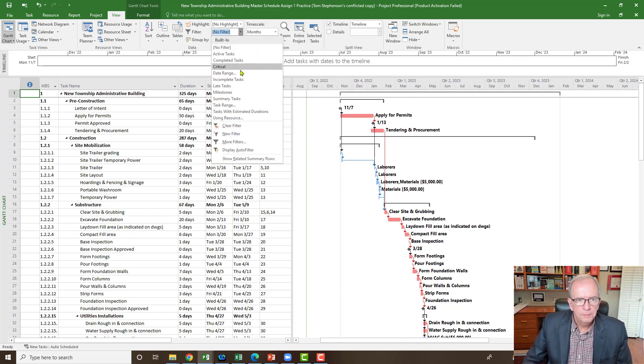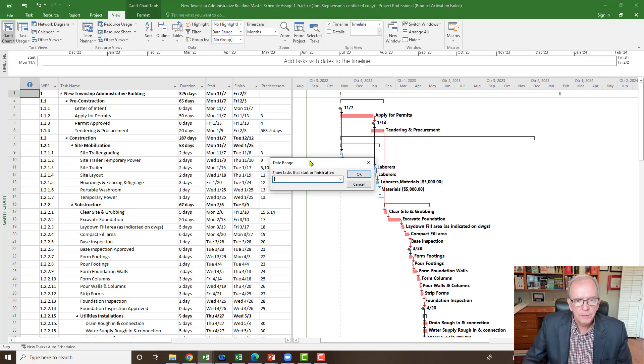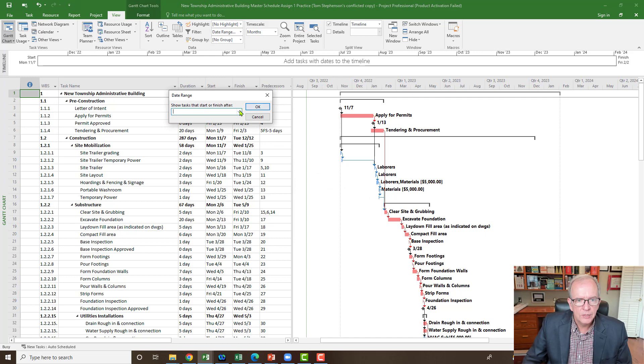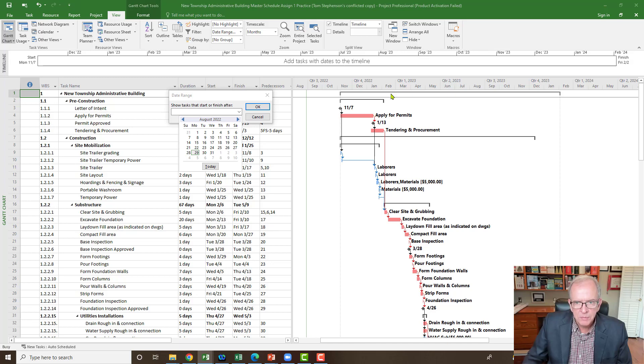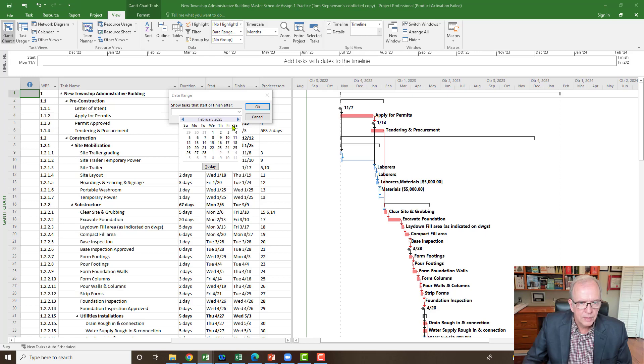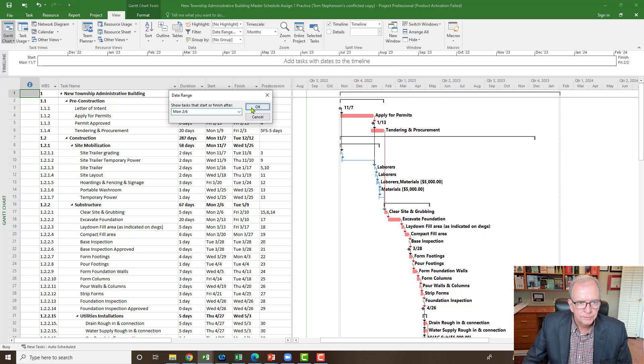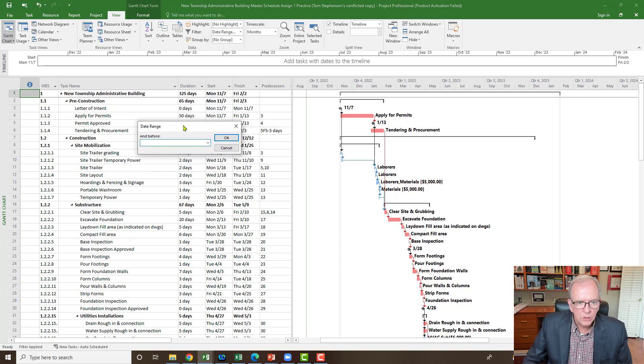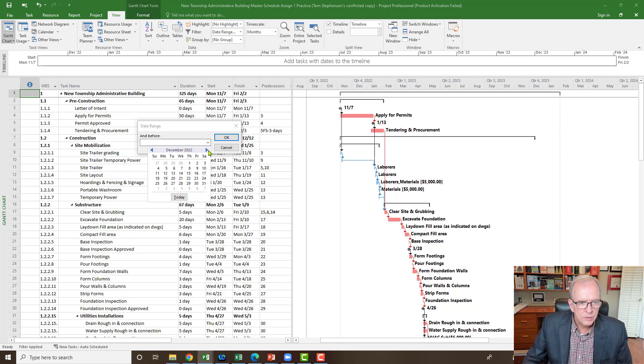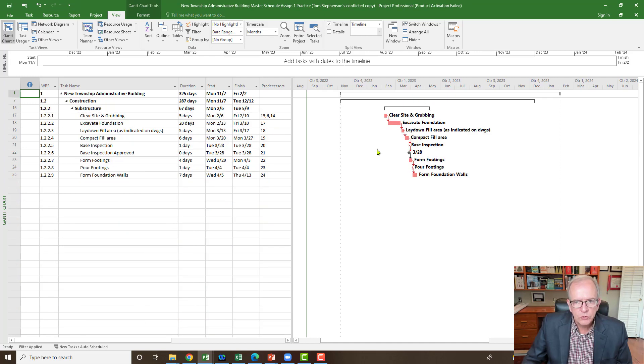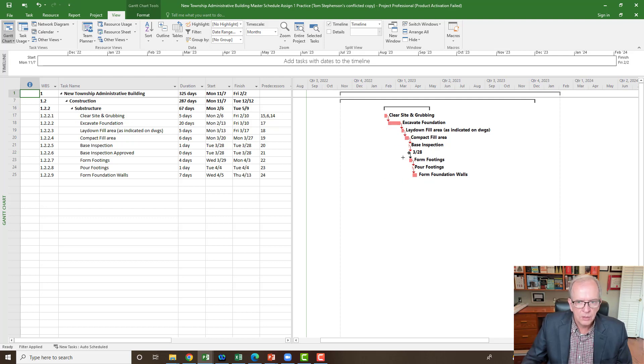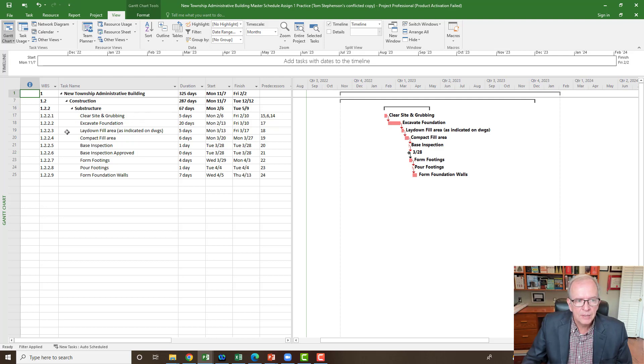So I can filter by the date range, all right? And to filter by the date range, I pick a date range. And so that date range I am going to pick is going to be, well, this project's starting a little bit later in 2022. So I'm going to pick a date range. Maybe I'll pick a date range like in February 2023. So let's go there. So I'm going to pick from the, let's say, February 6th. And then I'm going to go and I'm going to pick, so I'll take February 26th. And I'm going to pick maybe about five, six weeks. So we'll say into April. I'm going to click OK. And so that shows me the activities that are coming in that range. So these are all the activities that are going to come during that time period for this particular project.